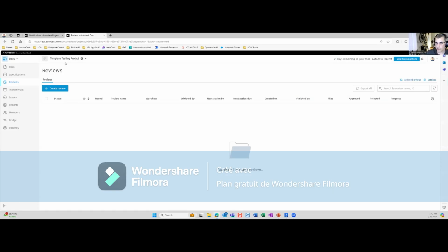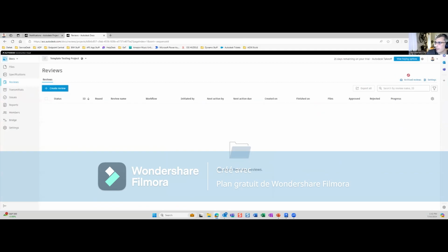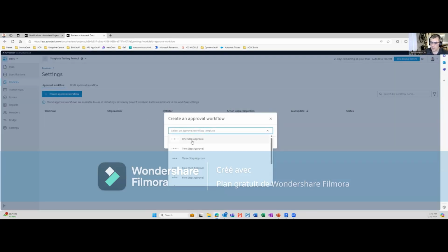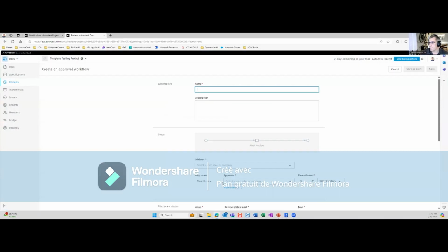So I'm going to show you, this is my testing, this is the template project. You could do everything I'm about to show you actually in a template as opposed to in a project. So when I go to create a review, whoops, that's if it's already defined. I'm going to go here to settings, okay, now I'm going to create an approval workflow. So this is an approval workflow. I just want to do a one-step review, me, client, back. All right, so this is going to be my workflow. So I'm going to go ahead and give it a name, client review. Give it a description.